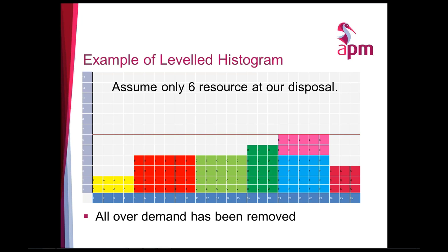The other thing they will do is split some of the activities if you want them to. Again, these are all options you can use in the software. The histogram, does it assume that the competencies of the resources to be the same? Yes, it does. All scheduling software normally assumes people work 8 hours a day, and for those 8 hours they're completely productive. In reality, everyone knows that doesn't happen.